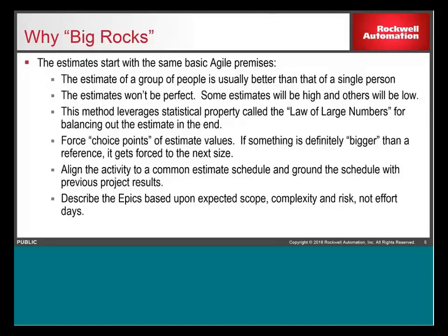And again, one of the things that you want to do is try to align the activity to a common schedule. Usually if you have a known funding schedule, for example, some companies have projects that are funded on a quarterly timeline or whatnot. So you want to try and get some of that estimation pre-work and the estimation completed ahead of those. And then once the funding's in place, when do you think you're really going to start? That helps determine when you are going to be done with certain aspects of the project.